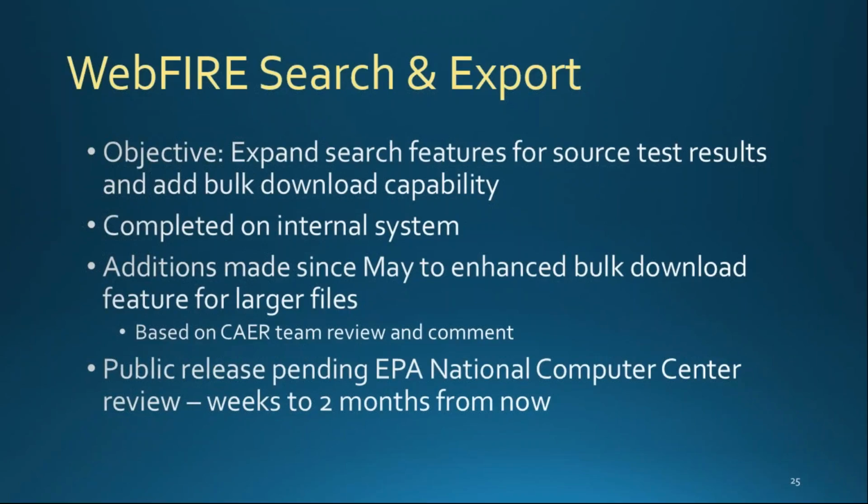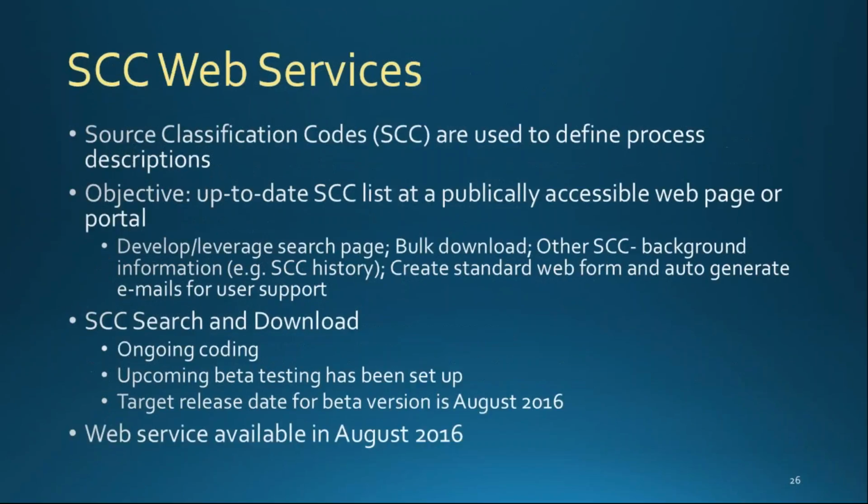And so this work is now pending a public release, which depends on our National Computing Center, which hosts WebFire, and they have a review process. And that can take from weeks to a longer couple months, depending on how much they decide the security needs to be reviewed on that particular project. But so keep looking for that. That's coming hopefully soon. Soon meaning at most a couple months from now.